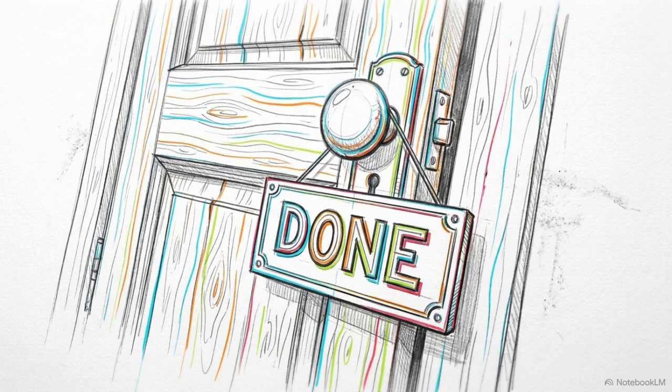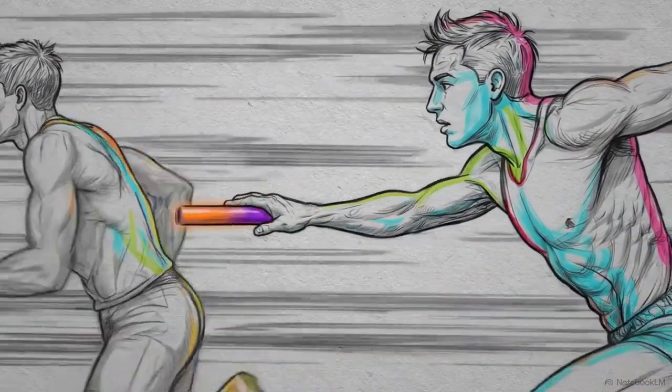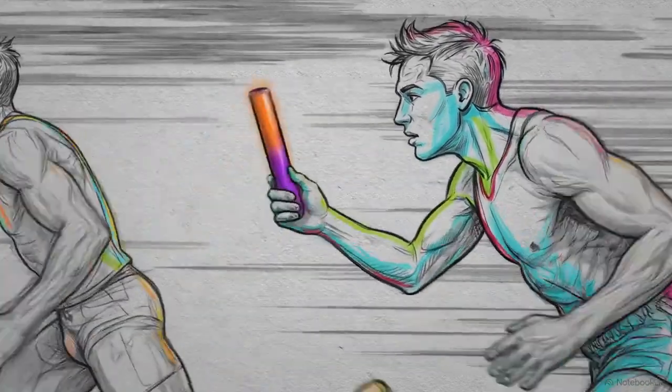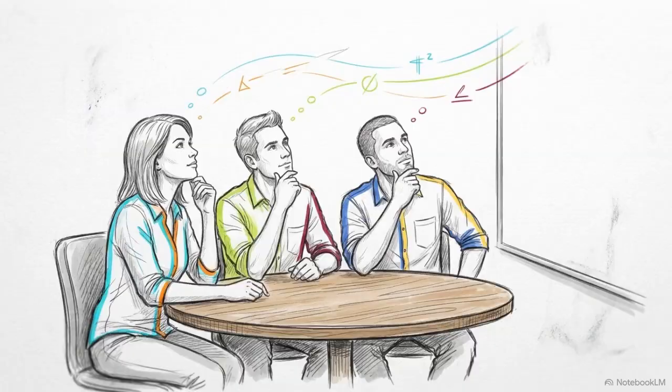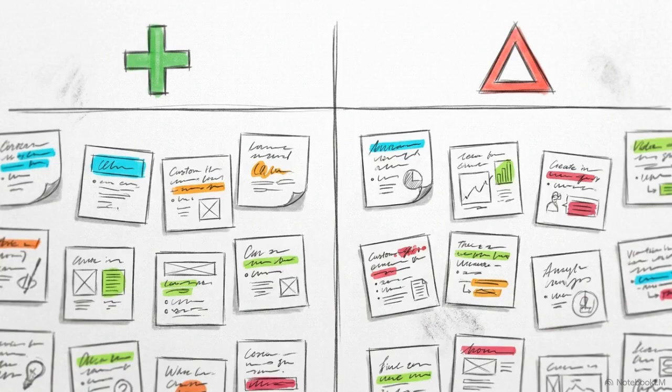And finally, step 5 is the project closeout. A project does not end when the event is over. Instead, think of it as passing a baton to whoever will lead the next project. Perform a retrospective to analyze the performance. By documenting what went well and what needs improvement, the team learns how to make the next project more efficient.